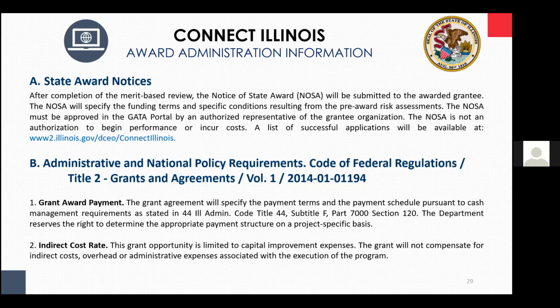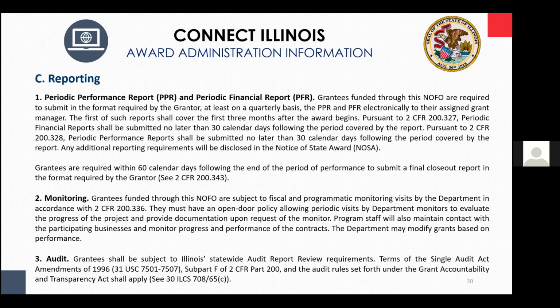All right, and so moving on, there's a piece here regarding reporting, monitoring, and auditing. With the award of a grant, a grantee can have up to 25% of the funds immediately upon execution of a grant agreement. And then essentially they can be reimbursed periodically throughout the duration of the project. If a grantee would like to accelerate their deployment, they're incurring costs, and they'd like to be reimbursed on a relatively aggressive time frame, we will do everything that we can to reimburse you in a manner that will speed up your deployment rather than slow it down.